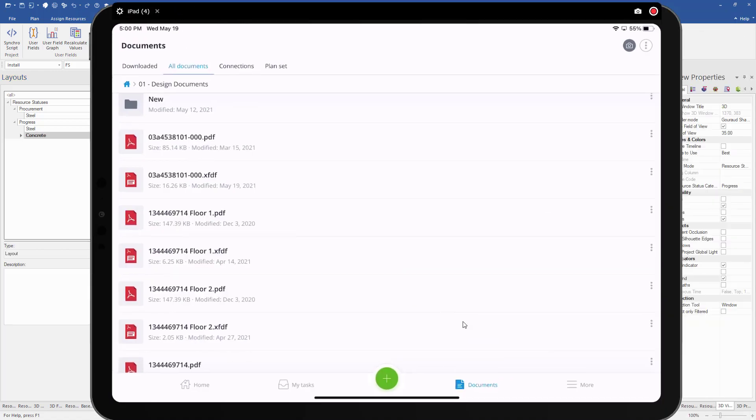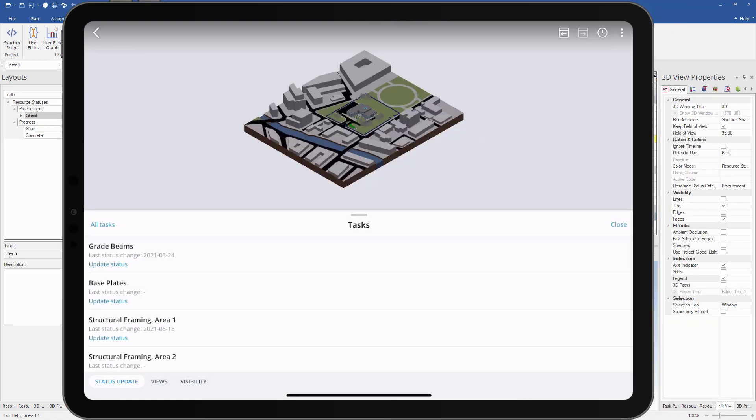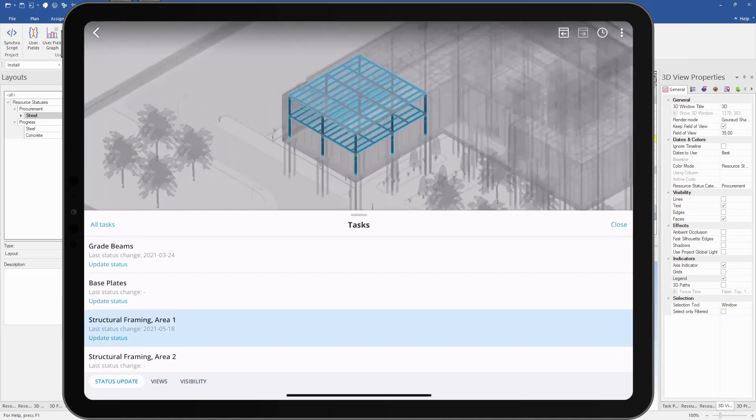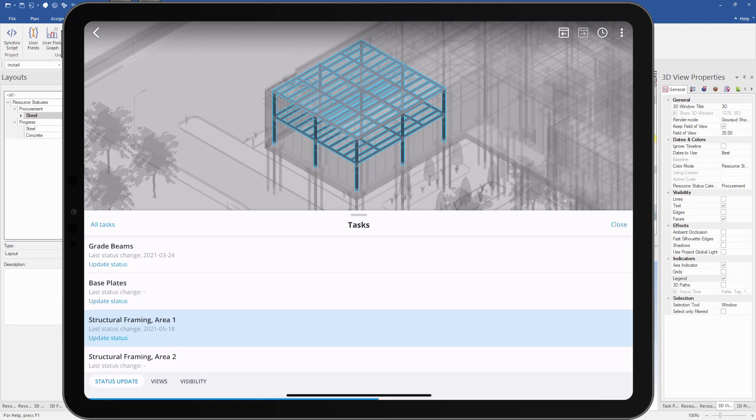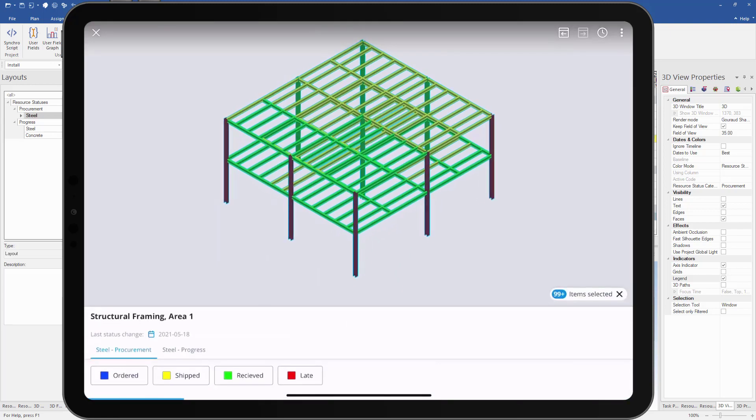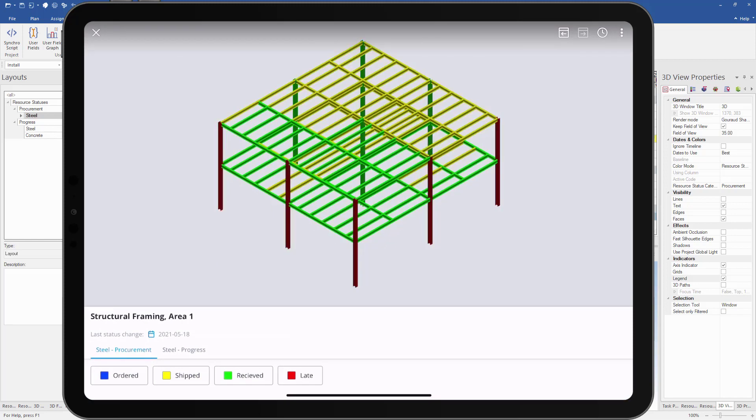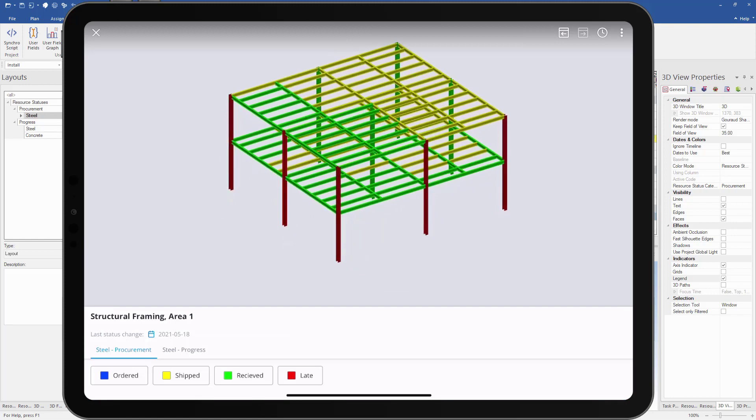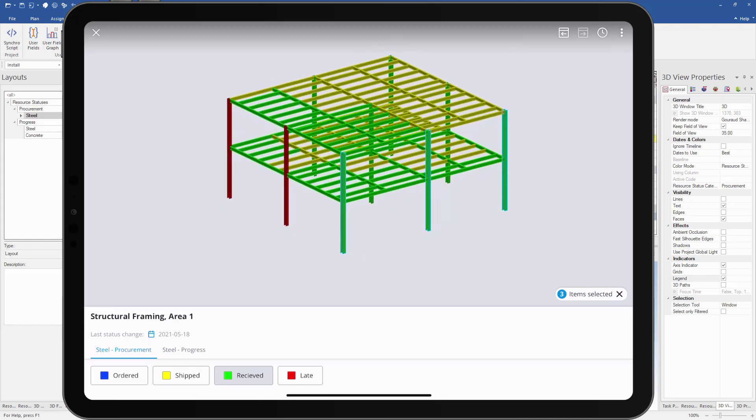If we go back to our field app, we can open up our status update module here. Let's select our structural framing area one. This will highlight all the resources assigned to this task. Now we can select the update status option and it will bring us to the resource statuses created and assigned in 4D Pro. Using the field app, we can see everything that has been ordered, shipped, received, and update the statuses from the field. Let's say these three late uprights have been delivered. We can select them and update their statuses as received. We can now see they are green and we only have two red late uprights left.